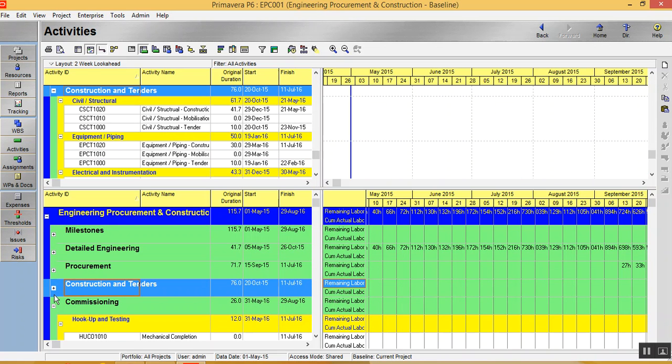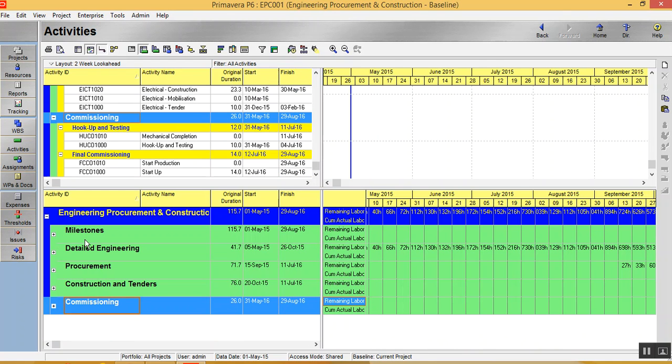I just make it a little systematic. I'm just clubbing the activities based on the WPS. So now I have some quick datas: the complete project, the engineering, procurement and construction.